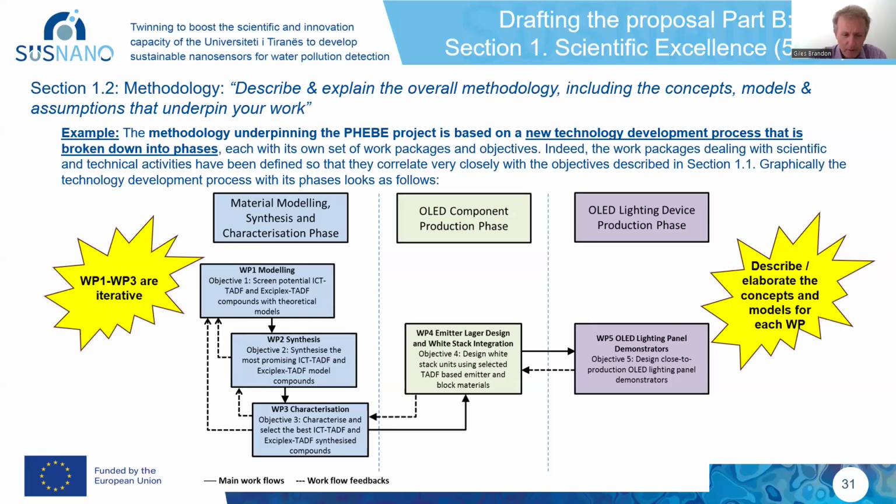So what I did was, in just trying to describe the methodology, I have a background in the past of working on product development in the automotive industry and medical technology sector. And there, rather like with project management, where we have an initiation phase and planning phase, there's also heavy usage of phases, breaking down projects into technology development phases. So I took the liberty to look at our Phoebe project and identified main phases, and then I gave them titles, and then I showed where the work packages aligned with those phases.